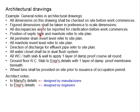Next: all perimeter drain invert levels refer to the site plan; all manhole invert levels refer to the site plan; and directions of discharge for the effluent pipe refer to the site plan. All of these have a similar consideration — they depend heavily on site conditions and need to be properly adjusted on site. The architectural drawing indicates the existence and how the system works to ensure functionality, and the rest is left to site personnel to make it effective.